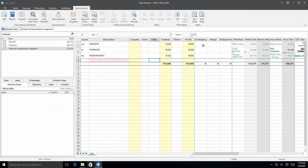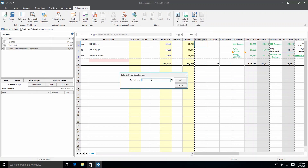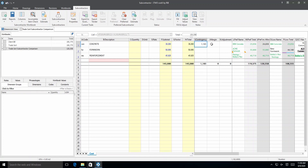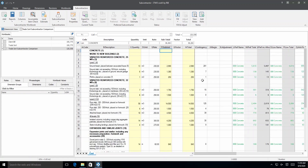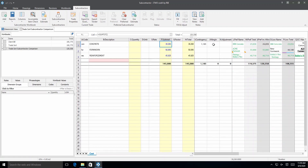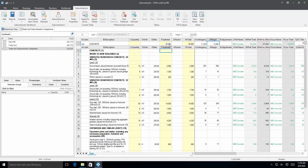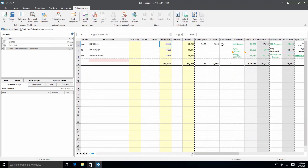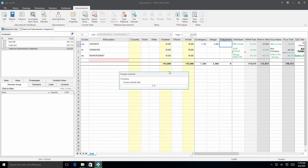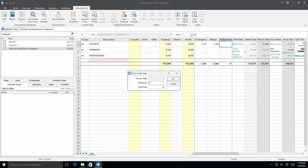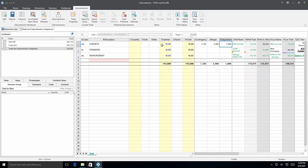The subcontractor workbook contains three allowance columns which we previously renamed to contingency, margin, and adjustment. We can add markups to these columns if required. The markup allowances may be done at both level 1 and level 2 of the workbook. Click the fill with percentage formula and enter a value of 5 — this will apply 5% to the preferred subcontractor's total for all the items on the second level. Drill down to verify this has occurred. Then for the markup column, use the same function but this time use a percentage of 10. Notice that the formula has been entered on level 2 and totaled automatically on level 1. For the adjustment column, use the fill to lump sum function again to spread $1,000 over the cells. Drill down to level 2 to verify this has occurred.